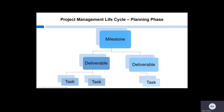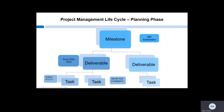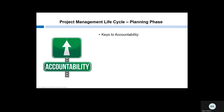Let's go back to our case study for an example of milestones, deliverables, and tasks. The first milestone for the project was submitting the IND application to the FDA. There are a lot of documents required for an IND, but one of these is the form FDA 1572, the investigator statement. The PI's curriculum vitae needs to accompany the form, so we need to collect that document. We also have to list any sub-investigators who will be on the study, so we need to discuss the form with the PI to make sure everyone is listed. Another deliverable is the protocol — one element we need is the sample size calculation, so we need to determine who is going to do the calculation and write that section. Does someone on the team have that expertise or do we need to seek out a resource? Wow, this is a lot to manage. How are we going to keep things moving?